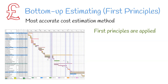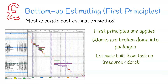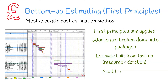First principles are applied to the detailed cost estimate. The works are broken down into packages, and estimates are built from the task up, considering task duration and resource requirements. This method is the most time-consuming; however, it offers the most cost certainty.